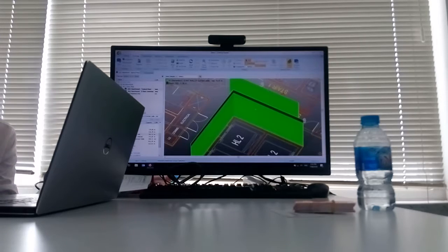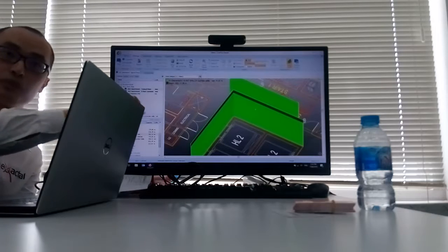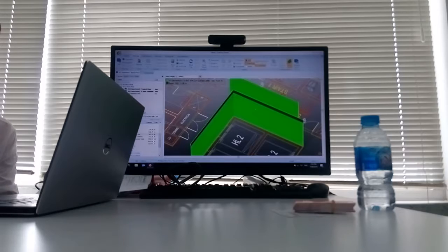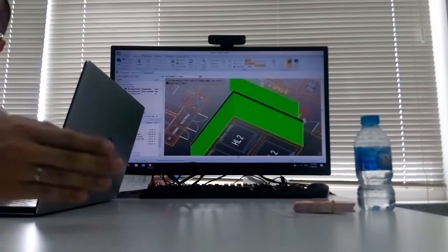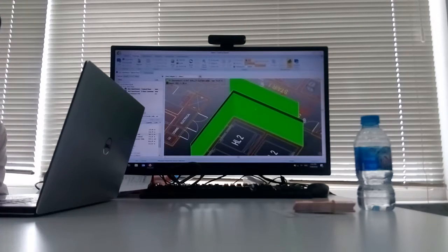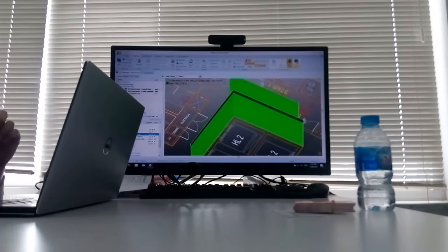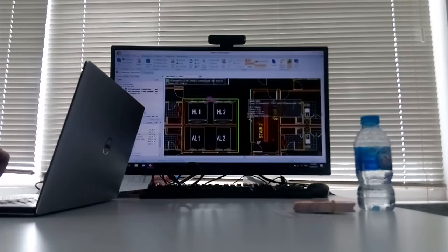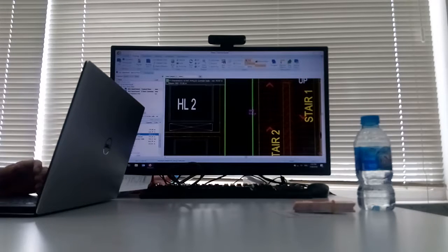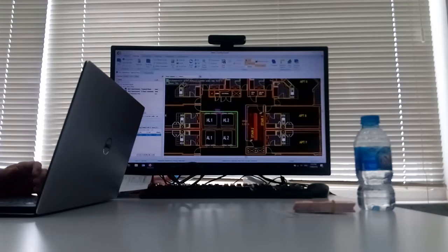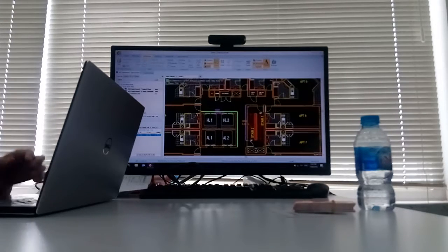It's not automatic. You are the one to create them separately and deduct them separately. The software does not detect that after masonry, when you input the beam, there is a deduction. You are the one to define them. You must deduct. So the other way, if you want to do the deduction and show it specifically, I will show you in this number 2. I have a beam here and I want to do deduction.